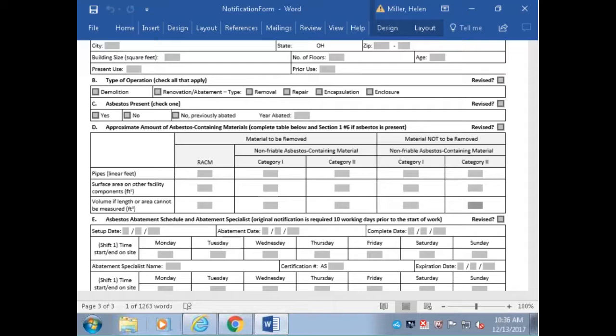Why do we have to put in the fire department? When is it applicable, Jim? The fire department is only when they're doing authorizations for fire training. So the fire departments are required to go through and or the owner operator to remove the asbestos before doing a fire training. So that is when the fire department information would be required.